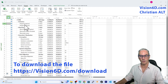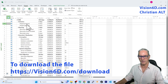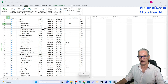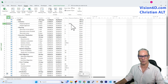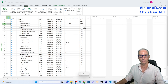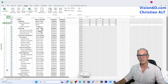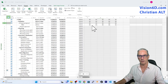Looking at the project proposal task in this project, we see that it has a duration of five days. It is assigned to Project Manager 1 (PM1), and the quantity of work is 40 hours. If we go now to the task usage, we see that the work is distributed equally over every day of the week, 8 hours a day.